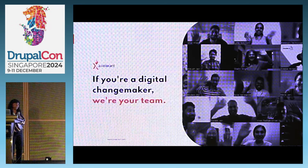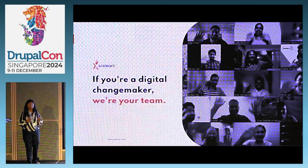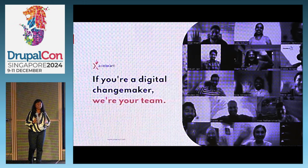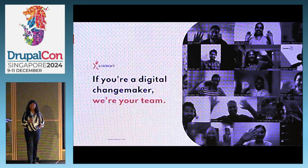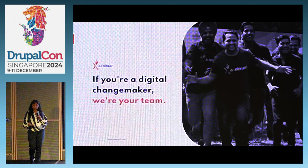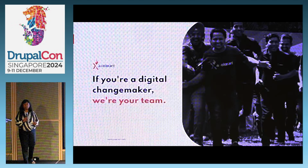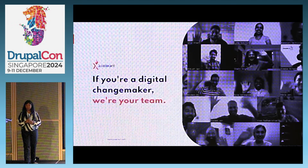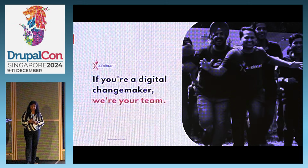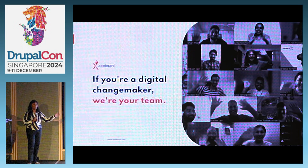And the next part of the journey: how the IDMC project started. As you see, when we want to get a project, we submit RFPs. The request for proposal was submitted for the same, and we submitted it from our Netherlands entity. The RFP was very challenging. The client was asking for a tight schedule of 3 months. That was the first constraint they had. And the entire architecture needed to be changed. Technically, they were having a Drupal backend and a Drupal frontend.